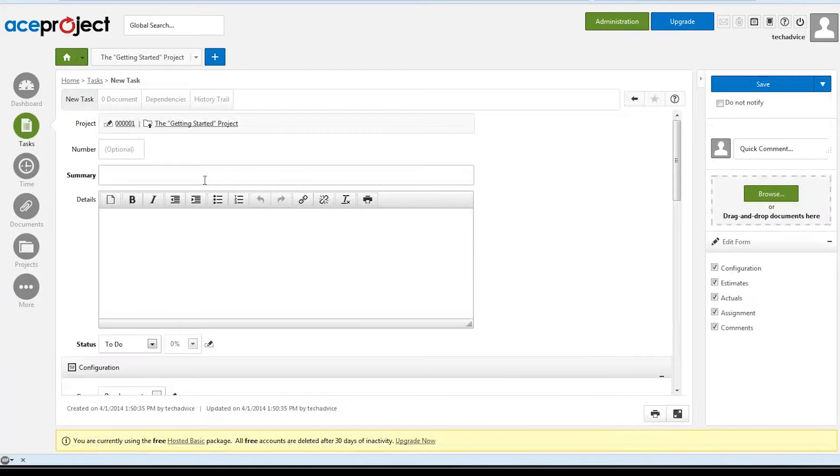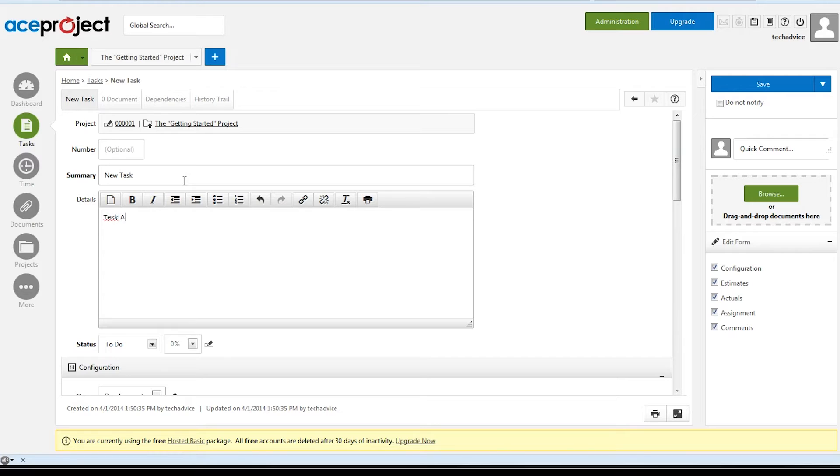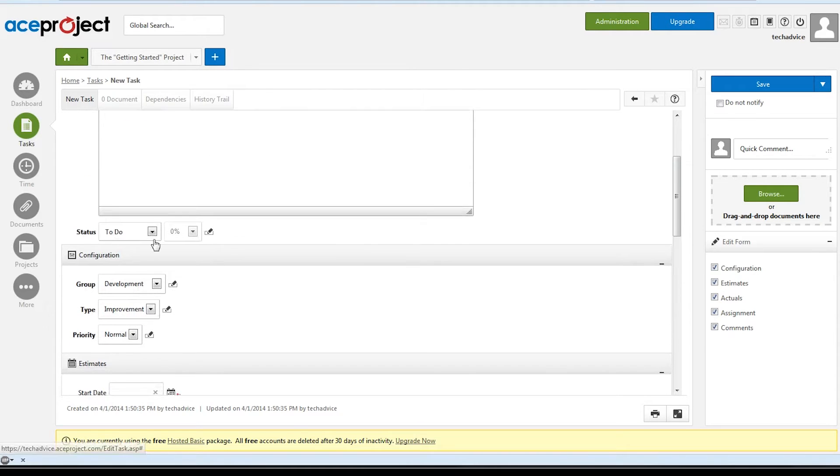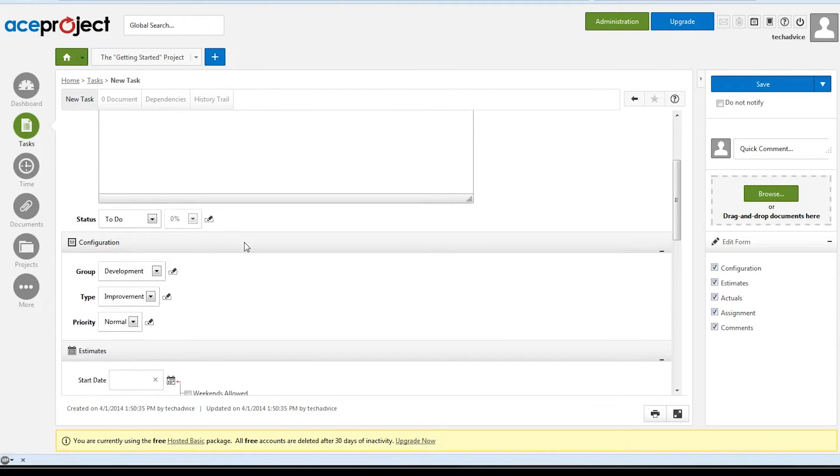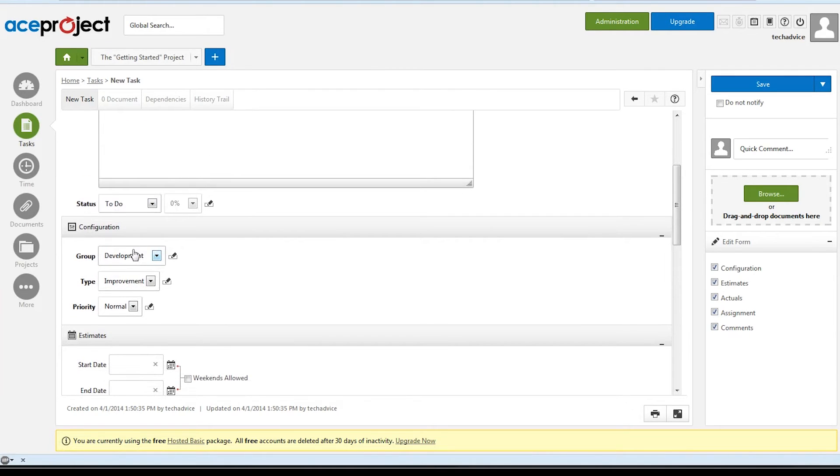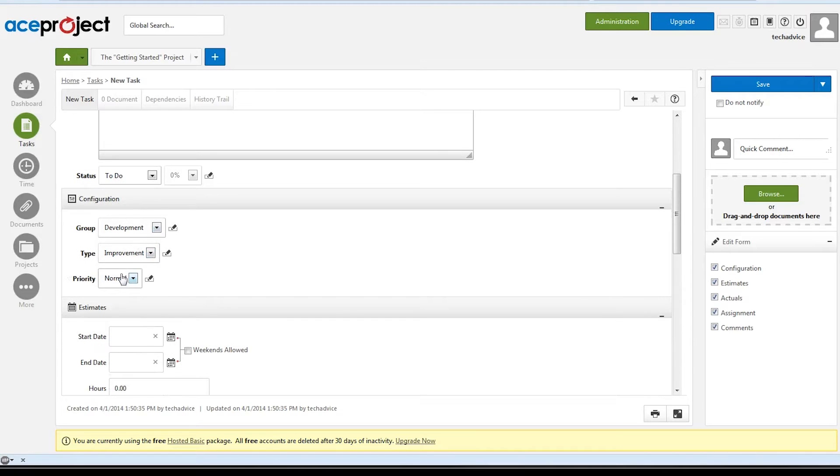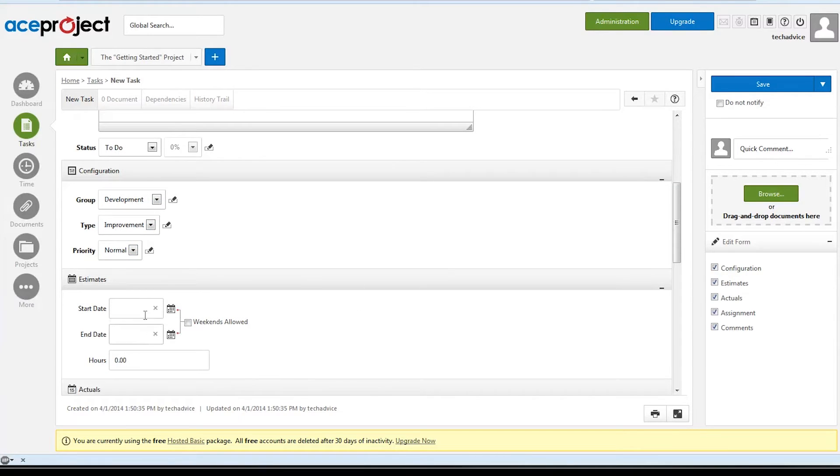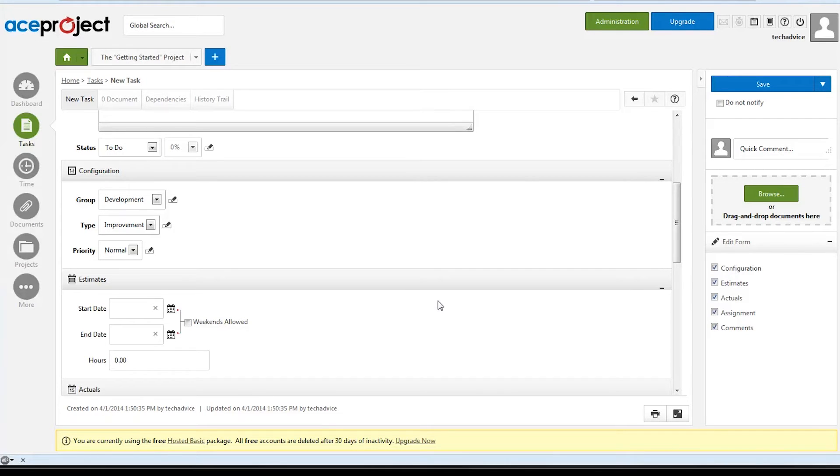We can then enter all of the details, such as a summary, additional notes, the status on it, what group it's assigned to, the type, and the priority level. We can put in some time estimates that we can later compare to how much time our team logged while completing it.